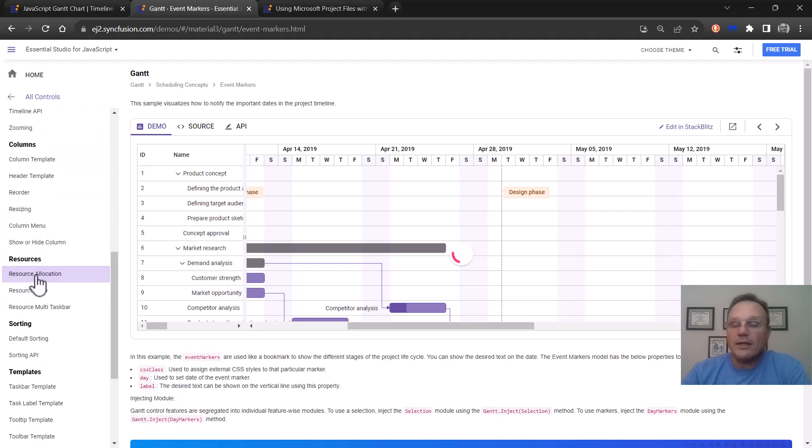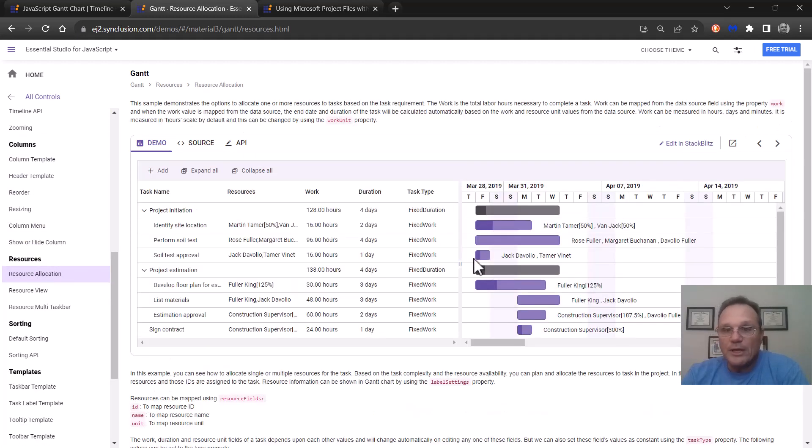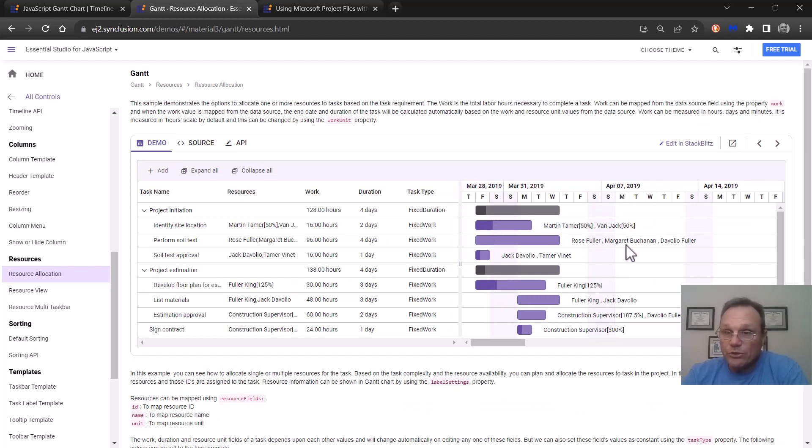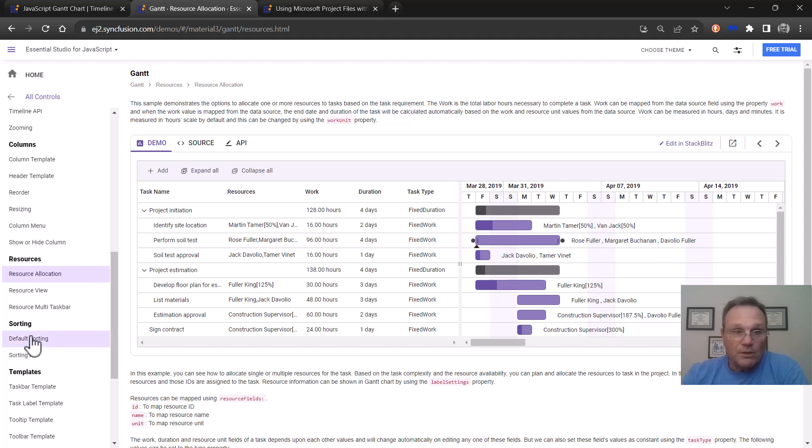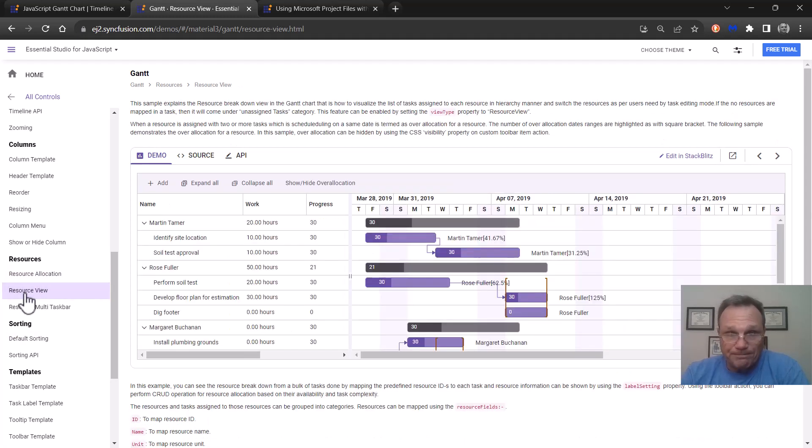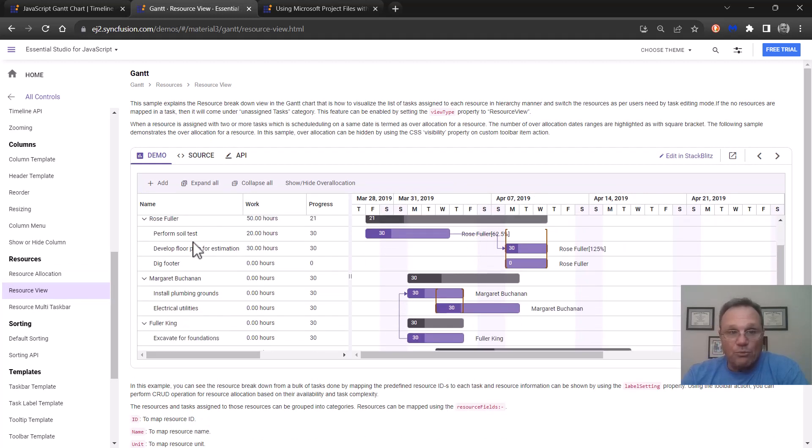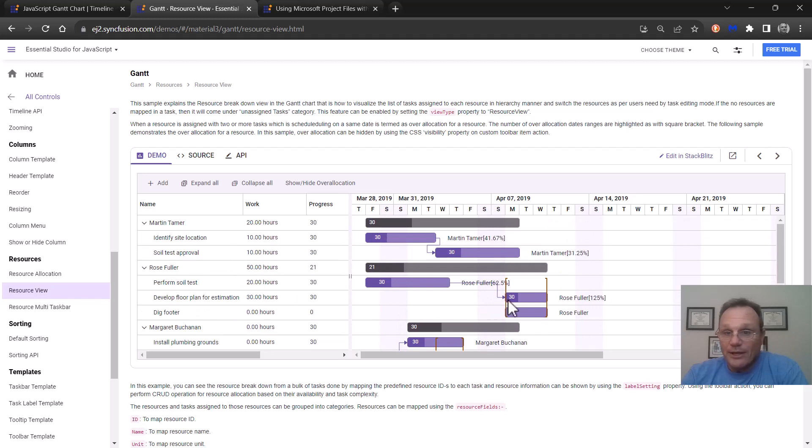Resource allocation. You can put at the end of each taskbar, you can show what resources are assigned and their usage percentage. You can also show this in a resource view. So here we have Martin is doing these jobs and Rose it looks like is overbooked over here.